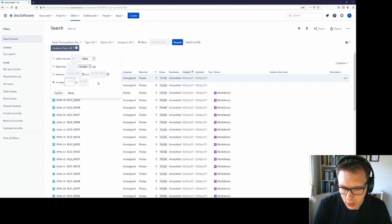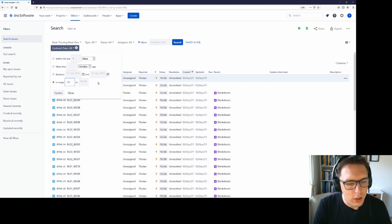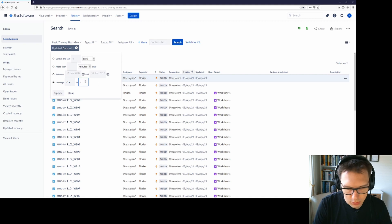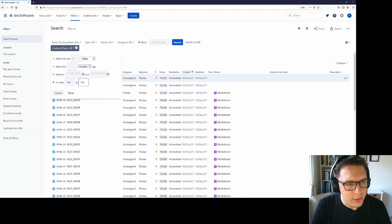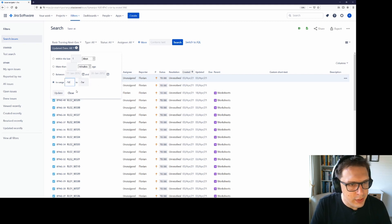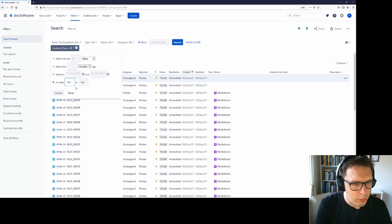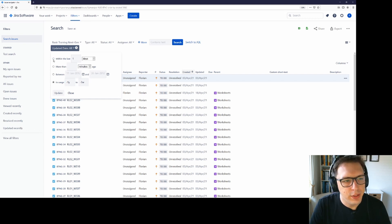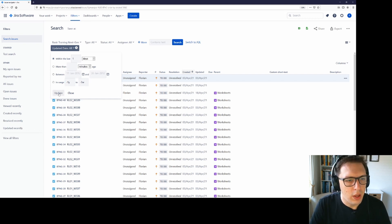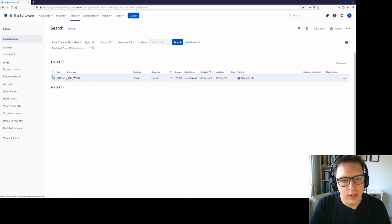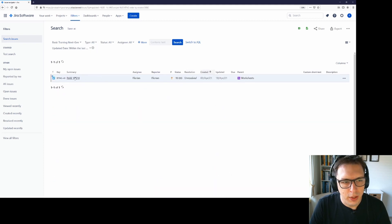So if you want to see all items between one week and three weeks ago, you would do it like this. W is week, D is day, H is hour and M is minute. I'll stick within the last one day for now though. I will update this and I can see that there's just one issue that got updated in the last day.